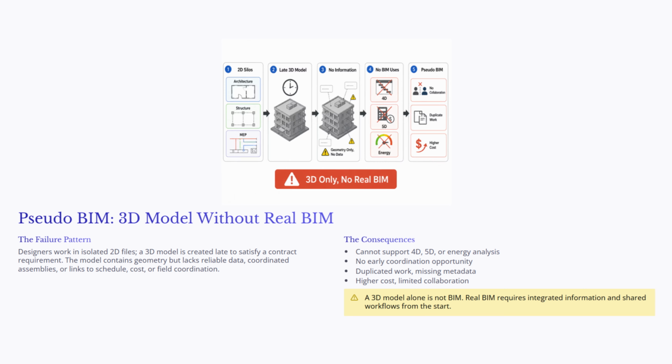Without structured data and shared workflows, the model cannot effectively support 4D schedule simulation, 5D cost estimating, energy analysis, or model-based coordination. The consequences are serious. The team loses the opportunity for early coordination. Work may be duplicated. Metadata may be missing, collaboration becomes weak, and costs may increase.